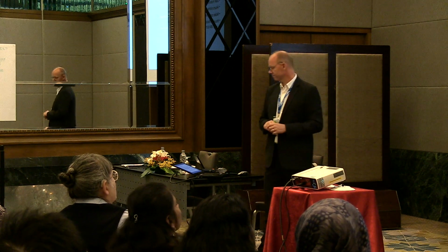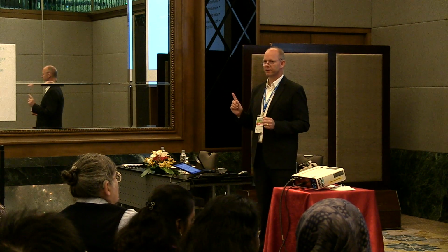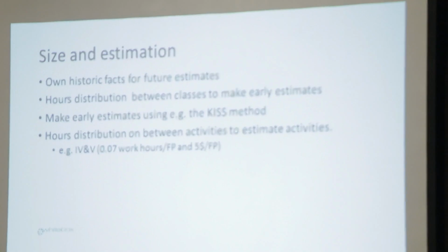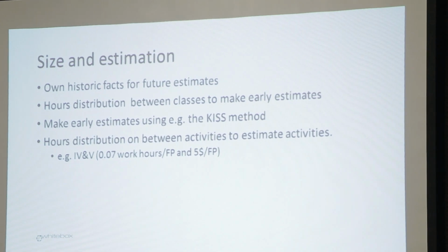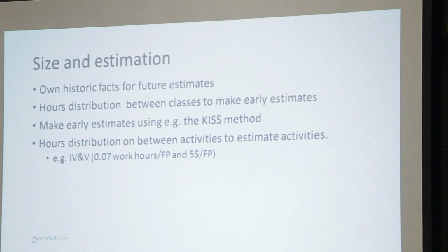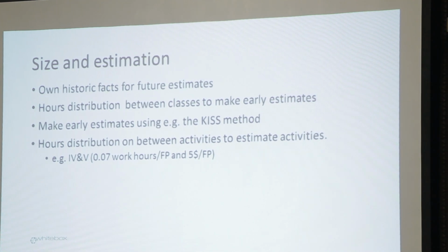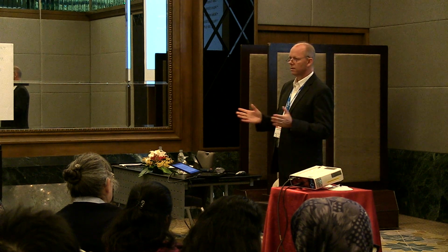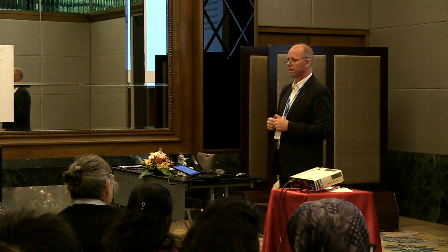Size and estimation. Old historic facts. Nothing beats your own data in your own company. Of course, you have to start somewhere, and that's where you can enjoy the databases that are available out there from ISBSG or from Jones, from Finland, many places. So there is some interesting data you can compare your performance, your cost, whatever, with, but nothing beats your own experience.